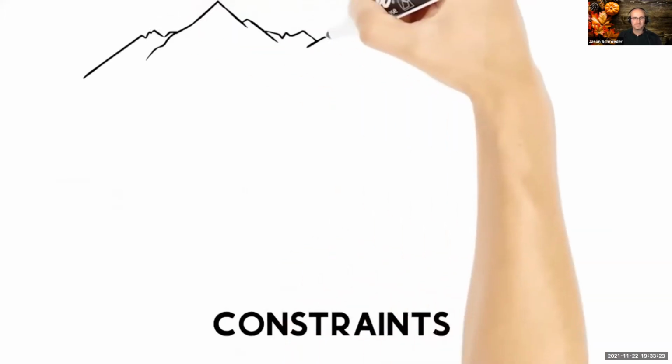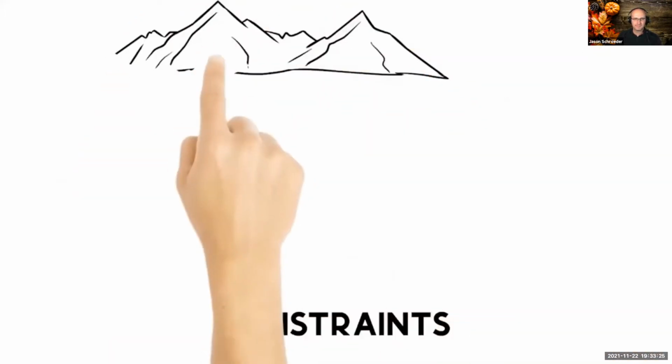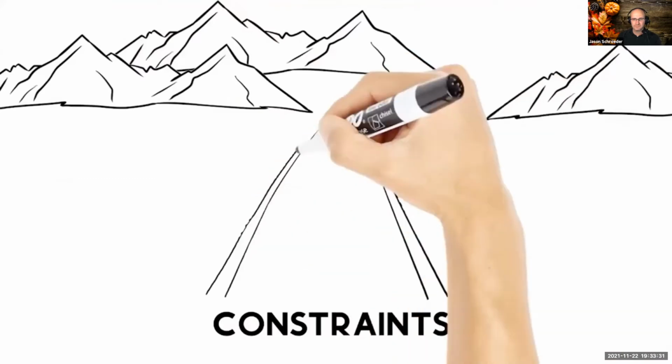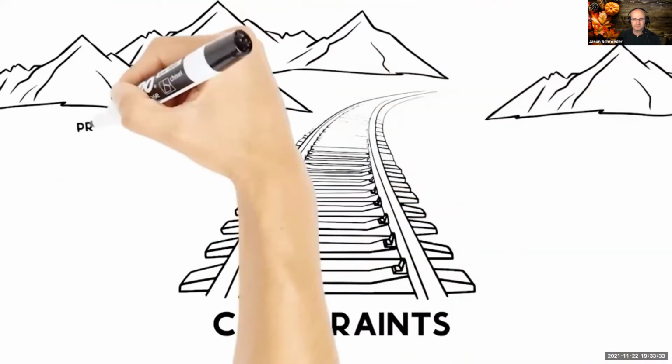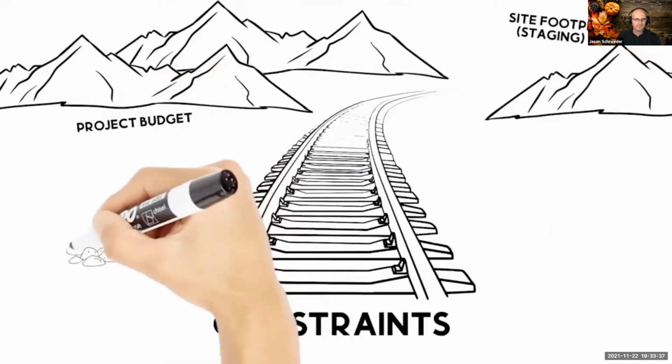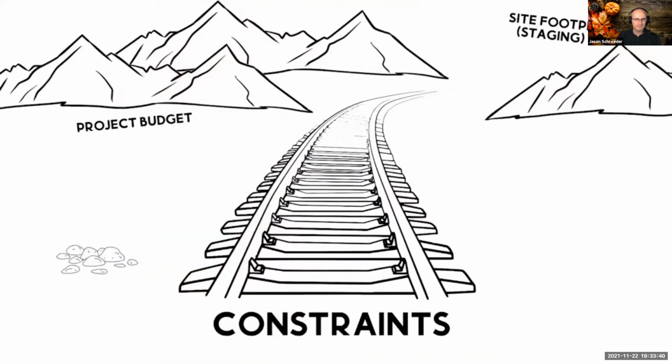We refer to constraints as items that constrain us overall that we usually are not moved by the team. These are big things that we don't really like to say day-to-day can be changed, like conditions of satisfaction or the end date and so on. I mean, they could change, but we don't start there. These are things that define the path we take to complete the project, which should be to achieve flow.